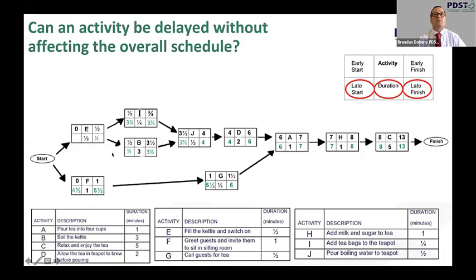But it begs the question, what if they chose the larger one? If they'd chosen the larger value and put 3.25 here as the latest finish for E, and if they were to work forward again, the knock-on effect would be B would be 2.75 minutes longer. And at the end of the day, when we go through it all here, C would finish at 15.75 minutes, which wouldn't be acceptable because we're not allowed to finish any later than 13 minutes. Our purpose is not to delay the finished project time, but to see where some flexibility may exist in delaying tests without delaying the overall project.